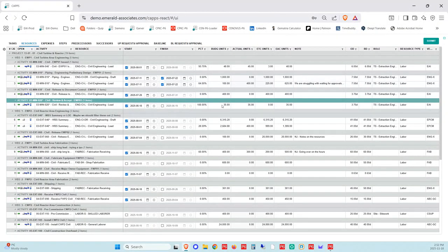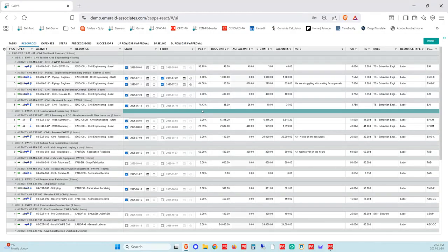So we had 35 hours as our budget, and our actual, we've got 35. So in theory, it's 100%, but it's not done. All right. Now, if we put that we only did 25, okay, it's going to recalculate. And of course, you might go over, right? In this case, by a considerable amount. All right.